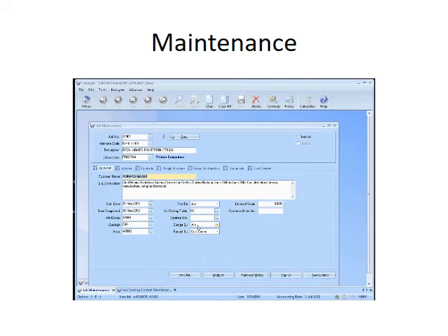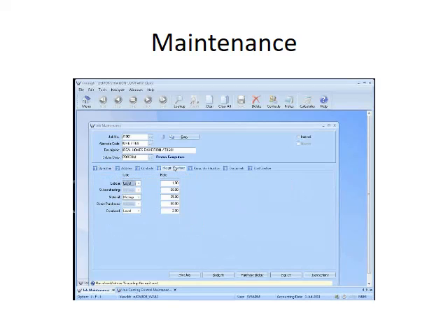Here with the charge by job or cost centre, that means that if it's set to cost centre, this is shaded out, but if it's set to job, it means that you can then come in here and set the different margins. So, as we talked about in summary, a job has 5 major components. It has your labour, subcontracting, being other people's labour, materials, being materials related to a job coming out of your stock, direct purchases, which is costs coming from creditors, or overhead.